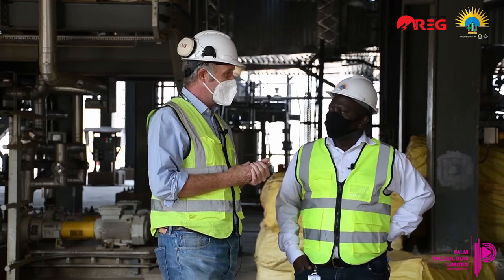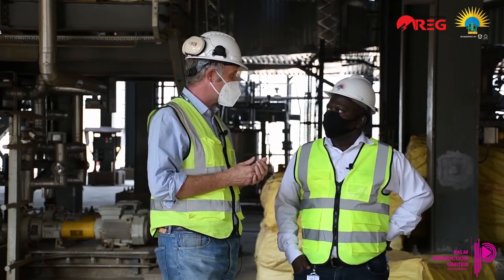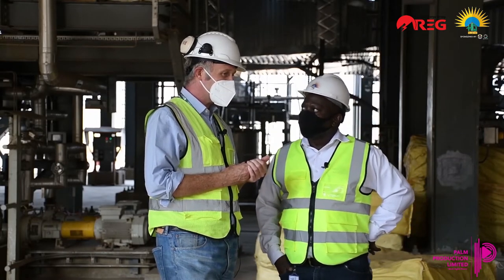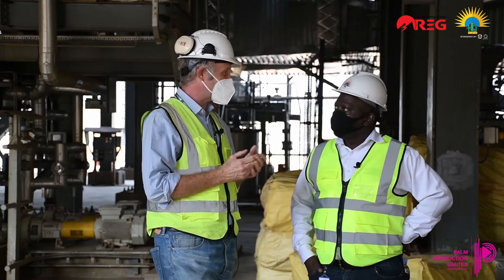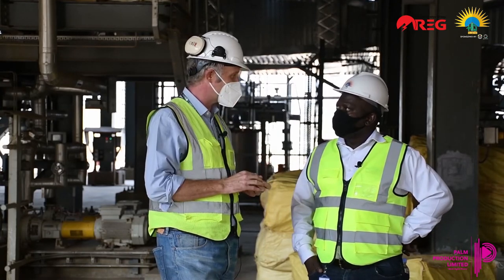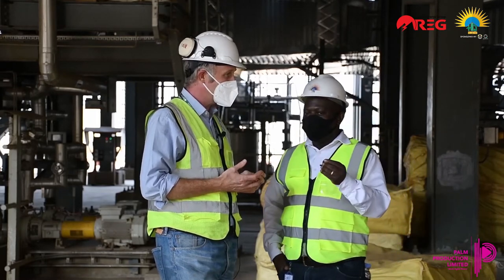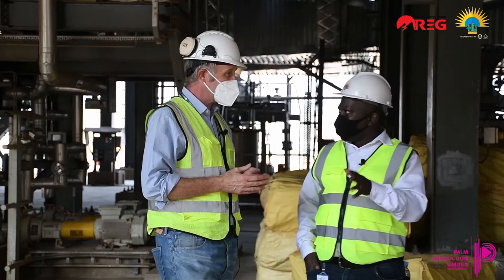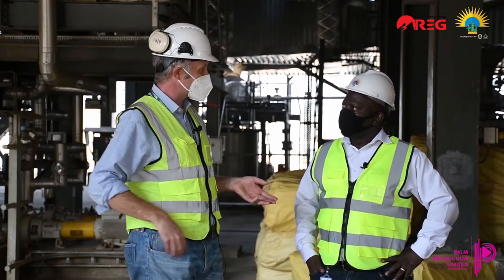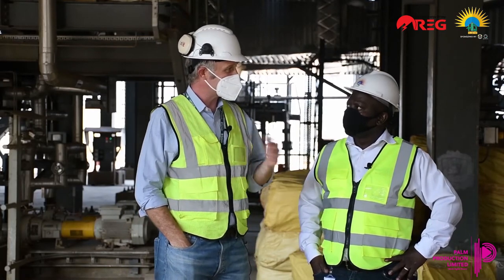We have, on the site at the peak, we had 2,500 people working on the site, and about 400 of those were expats from outside Rwanda providing skilled resources. The rest of them were Rwandans. What will happen after commissioning? Will that number go down? Even today it's down. We have 550 people here today working on the site. About 150 are expats and the rest are locals.